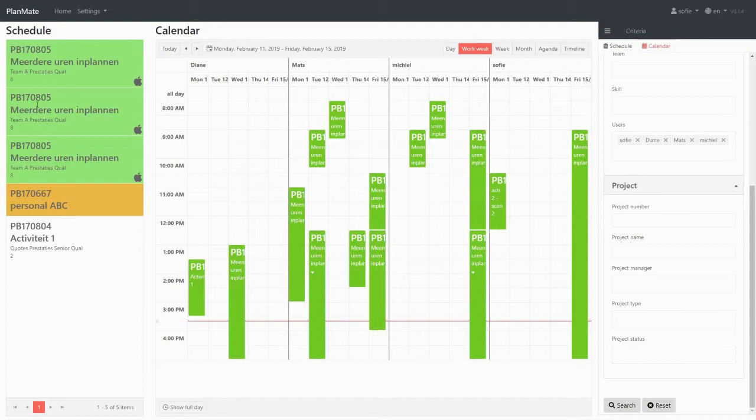Here is a final test that we did with multiple hours, but it's all little tasks of half an hour, of 20 minutes, of an hour, that are all somehow linked to one another. It's the person who plans who knows how they are linked. The system doesn't have to know it. And then they really say, okay, you will do this first day of the work, which means that your colleague can take this over from 10 o'clock in the morning, and then another colleague will do something in the afternoon with it, and in the end the project manager will call the customer and give the result of a certain analysis. So that is the plan, the reason why we created those things.